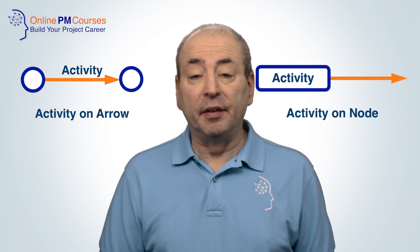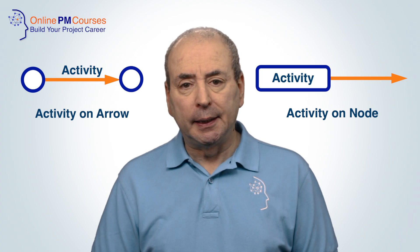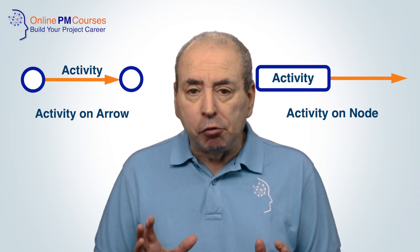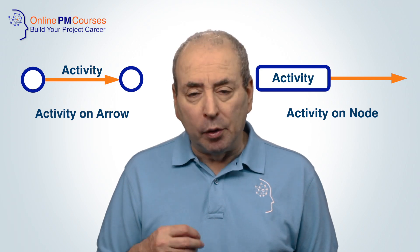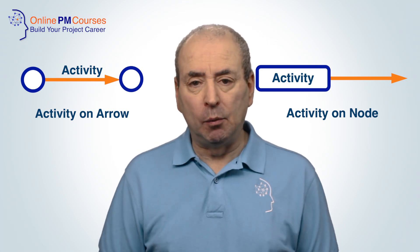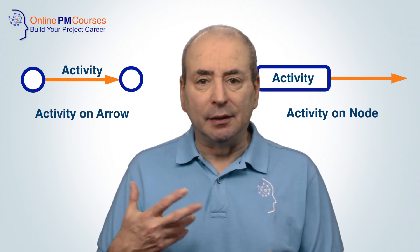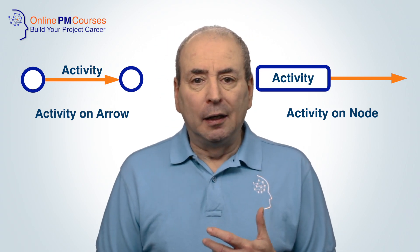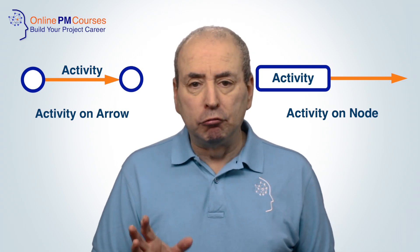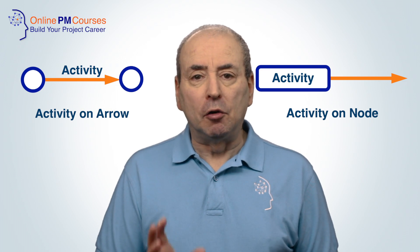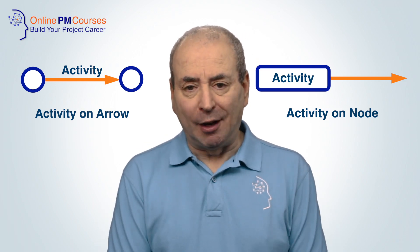It's important to note that for both approaches, the arrow lengths do not change from activity to activity — they do not represent time, they merely represent the logic of the diagram. There are also a large number of software tools you can use for creating this. Some are built into proper project management planning tools which generate your network diagram automatically once you've created all the logic of the dependencies, leads, lags, durations, and resource allocations. But there are also drawing tools you can use to create a network diagram from understanding the logic yourself.